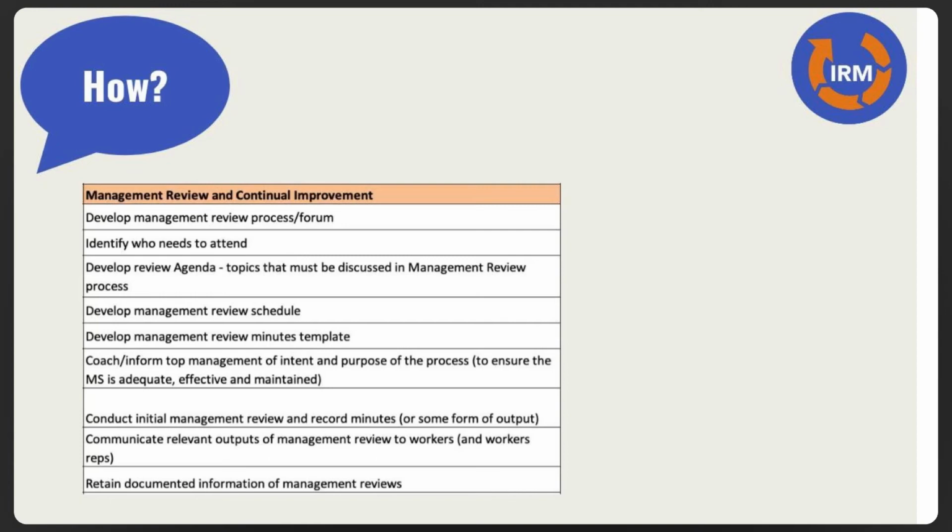We say, well, even during the implementation, if you're trying to meet several standards and it might take you 12 months to do that, we'll have management reviews 2 or 3 times during that time frame, where really the focus will be on implementation rather than all of the management review requirements of the standard, but just getting that management to look at the progressive implementation.